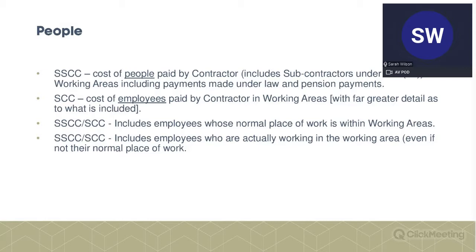Yeah, so both of these include costs for employees whose normal place of work is within the working area. And this is all very specific. So if you're familiar with NEC, you'll know that this is going somewhere. And it also includes employees who are working within the working area, doing particular work, even if that's not their normal place of work. So just bear those two in mind.